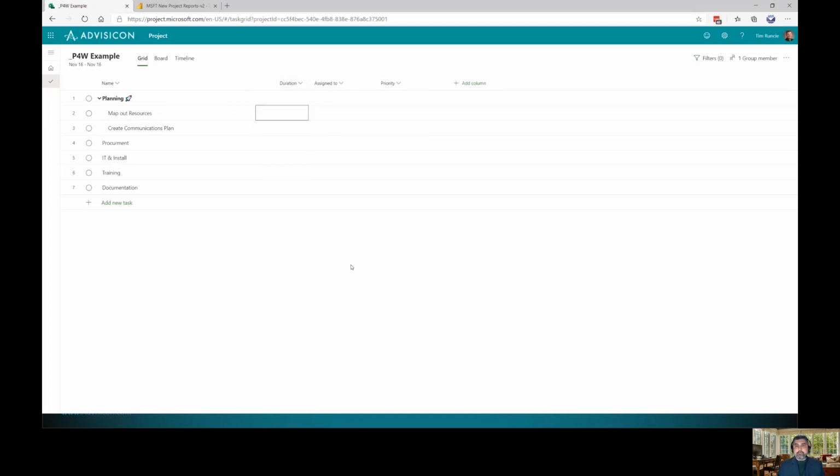So in terms of map out durations, I might say this is 4, and I hit enter. Notice it defaults to days. If I say 4 weeks, I'll put in 4W. If I put 4H, I get 4 hours. And if I want 4 months, 4MO, it'll start auto-filling that for you. With 4D, it gives you a subtle hint exactly where it is. A lot of people say, I just need to track where that is. So if that's 4 days, I can just type these in here.